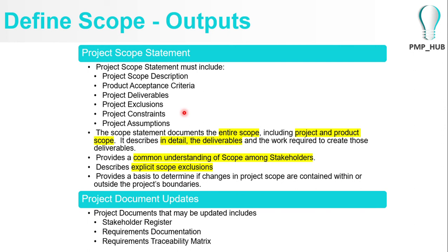Exclusions, you might discuss with the customers the scope exclusions. Okay, we will not cover this part under this project. Sometimes the customer originally thinks something should be included in the ERP system, but you might try to convince them and exclude it, so that you come across a concrete list of project exclusions.